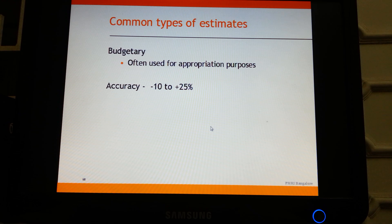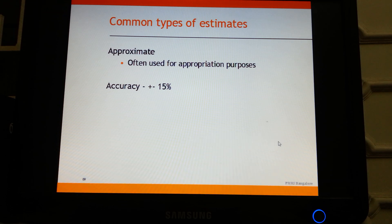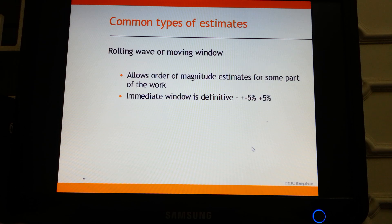For the budgetary estimate, the expected accuracy levels are minus 10 to plus 25 percent. For the approximate estimate, accuracy levels are plus or minus 15 percent. For definitive estimates, accuracy levels are plus or minus 5 percent, and this level of accuracy cannot be achieved without a WBS — without a WBS you will not be able to get a definitive estimate.